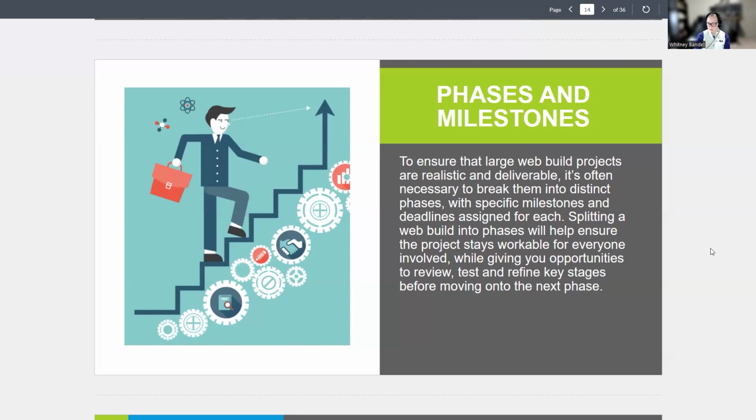So if you've got a project that's due, trying to give yourself a couple weeks or whatever would be a good amount of buffer. For the capstone, for example, I always give people a 2 week buffer at the end. So that way there's time to work on projects. Or let's say that you were working on a big video project, you want to have some sort of buffer where you're not running right up to the end, especially so that way you can get time for documentation and all of that.